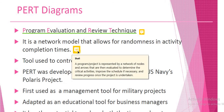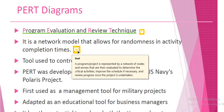A PERT diagram actually represents a network model where the program or project is represented by a network of nodes and arrows that are then evaluated to determine the critical activities, improve the schedule if necessary, and then review the progress once the project is undertaken.